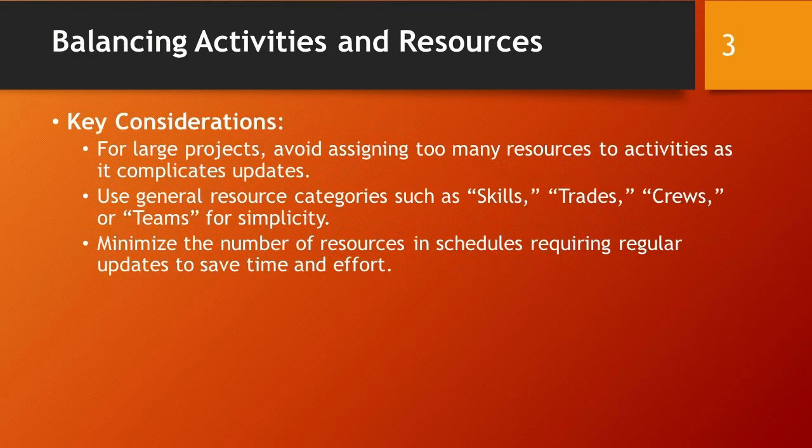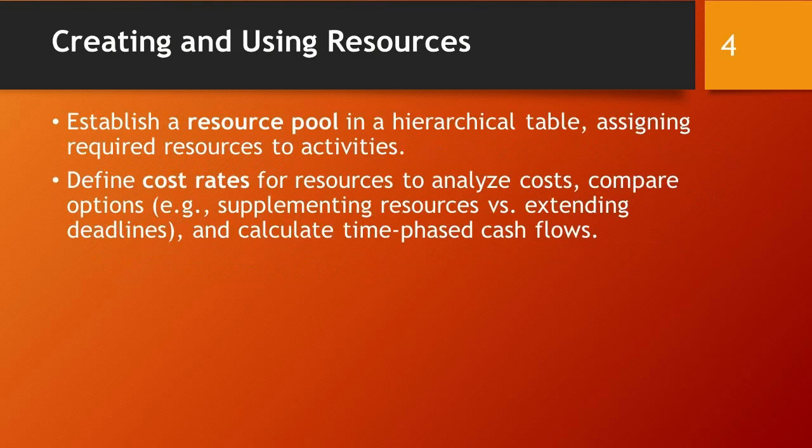When balancing activities and resources, there are key considerations to keep in mind. For large projects, avoid assigning too many resources to activities, as this complicates updates. Instead, use general resource categories like skills, trades, crews, or teams for simplicity. Minimizing the number of resources in schedules that require regular updates can save time and effort.